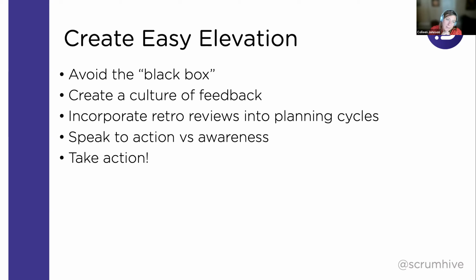I've also used retros combined with planning cycles, which is kind of how they do it in SAFe as well, if you've done the Inspect and Adapt workshop. I think having a good path around what needs improvement and how you pull those into action is super important. I mentioned either a Kanban board, or having them show up on team boards. I've used the giant Post-its that I see behind Scott there. You can use those to say, here are all the improvements we're working on as a team right now, and post them up in team areas, so it's constantly visible and everybody knows what that team is working towards improving.